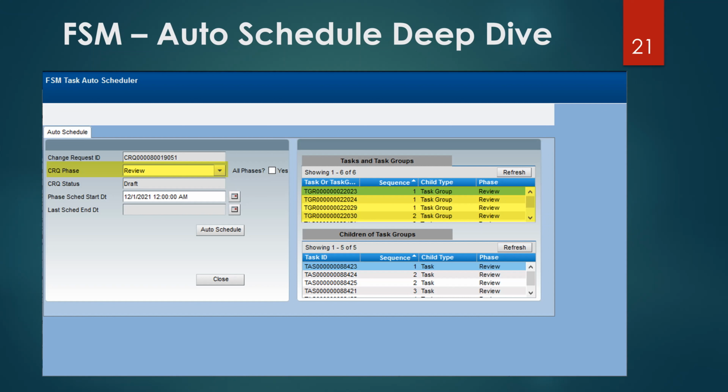So we went and set up a special central time zone business time and put all our holidays on it. And so we've got holidays in there that are 6 years out, because some of these go close to 6 years out in their tasking. And so you got to get all that in place in order to calculate properly. So every year we go add the holidays for 6 years away.